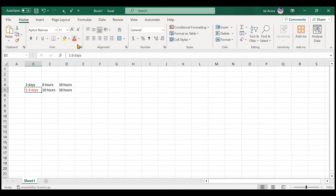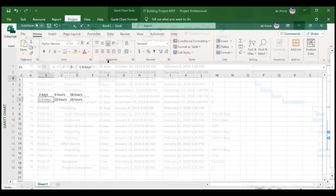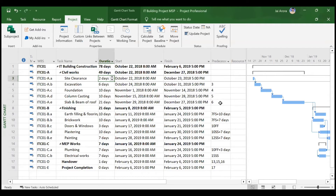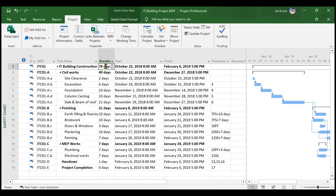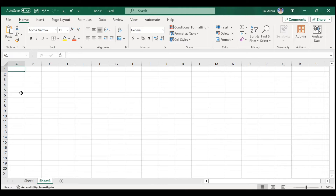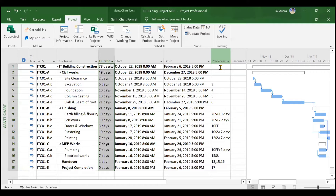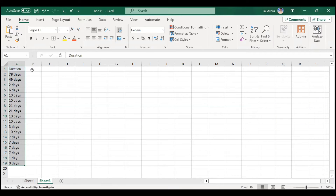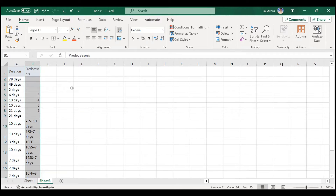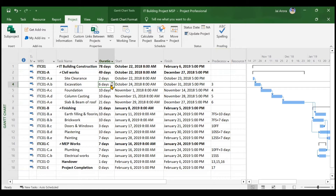MS Project will do this for all activities whenever you change the calendar to one with different working hours. The solution is to copy the duration column and the predecessors column before making the change. Copy from 78 days to the last row using Ctrl+C, open an Excel sheet, and paste. Do the same for the predecessors column. Now your data is stored and you can paste it back after MSP changes everything.